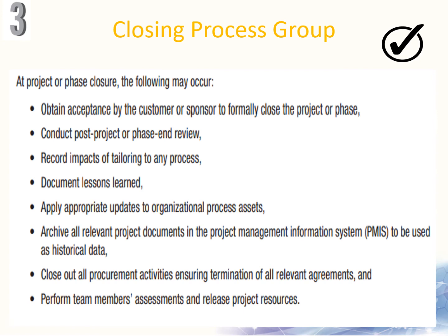Prematurely closed projects may include, for example, aborted projects, canceled projects, and projects having critical situations. In specific cases, when some contracts cannot be formally closed, for example, claims, termination clauses, and others, or some activities are to be transferred to other organizational units, specific handover procedures may be arranged and finalized.